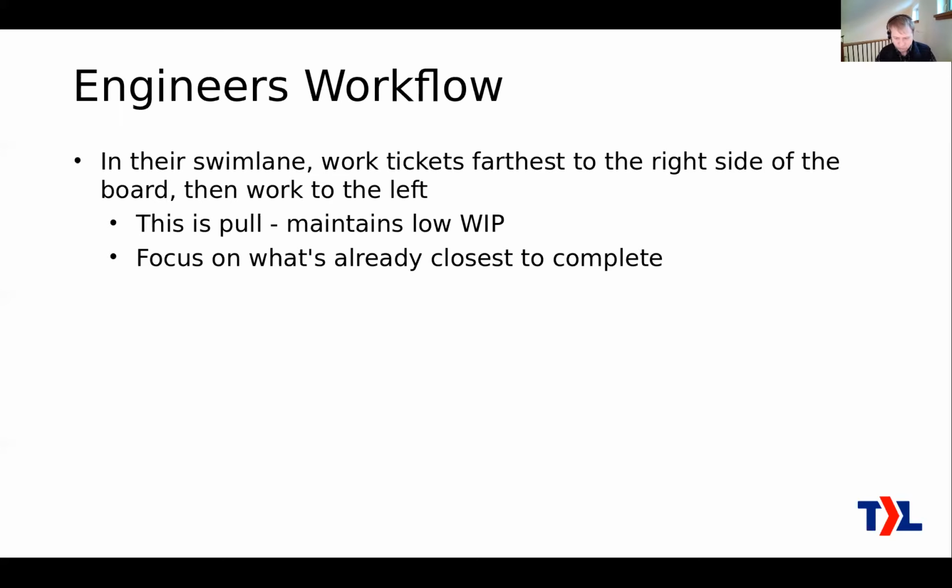So, if they have work that is in progress, they're going to work on that, close all those in progress things off. Maybe some of them might go to scheduled, some of them might go to waiting if we need some information from the customer. But as a project manager, you don't tell them when to start new work. You tell them what's most important, and they start it when they have capacity.